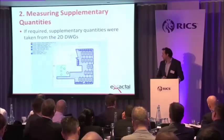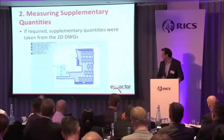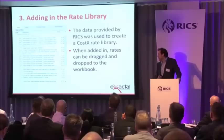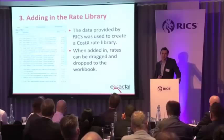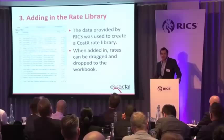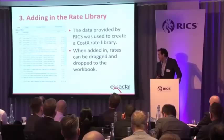Like most quantity surveyors practicing in BIM, they'll do their checks with 2D on the 3D model, which you might think is a bit redundant, but it is quick for extracting quantities. We did take off the floor area as well as it being automatically generated from the model, and we found that it was quite similar. Costex has a database function, and what we originally did was bring in the cost information from the BCIS documentation — the maintenance rates and life expectancies — into the database. Once it's in, it can be used on numerous future projects.